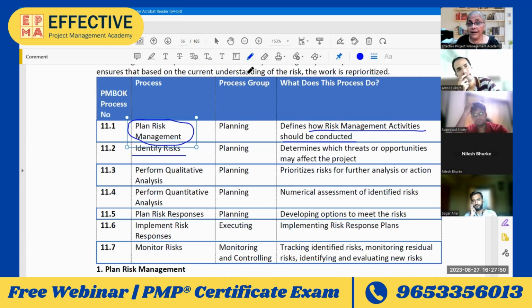When I update that, that project is over, so I can always see: this was the risk identified. What happened? Did it actually trigger? Oh yes, it actually triggered. What did those people do? They took this particular action. I can also plan for the same action. At least tentatively, let me write that this is a good, suitable response.